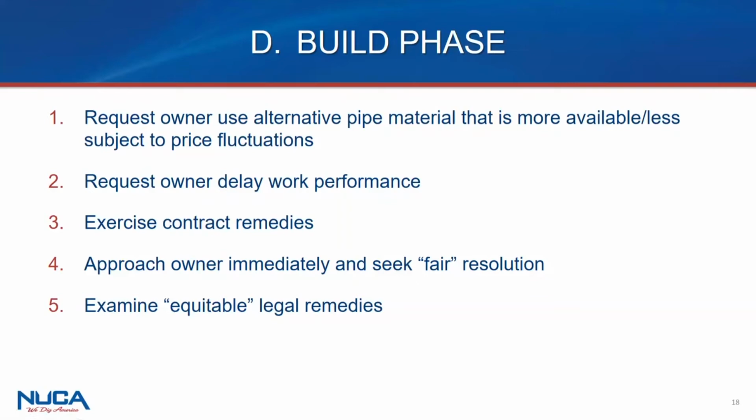The issue was the increased cost of pipe. And working behind the scenes, we set up a meeting with the city, with the general, the sub. And although the city was not under obligation to pay for it, they ended up agreeing to pay a third of it. Sort of again, the girl can't say yes unless she asks for it. And I think what's also important, that was an example of where that worked.